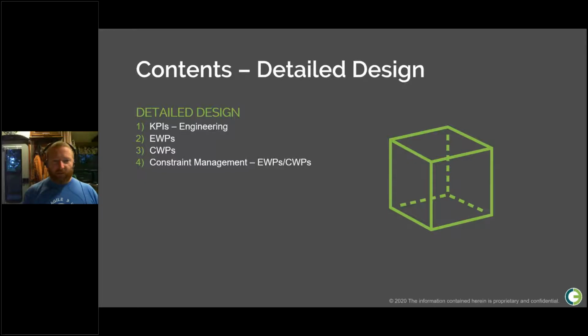This is your last chance during detailed design to get things right before the work transitions to the field. Any issues or problems cost far more to solve when they're discovered by an installation crew. Sometimes fixing things upstream in engineering can feel like a chore. And also there's typically this push on capital projects to just get it out there, just get going.